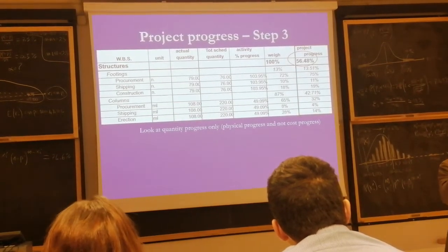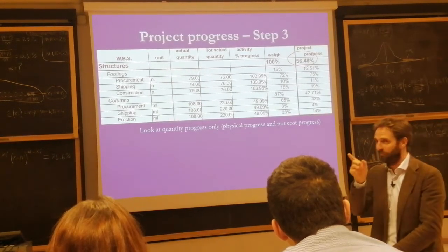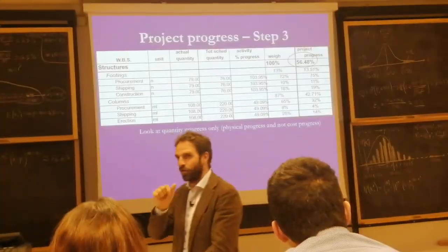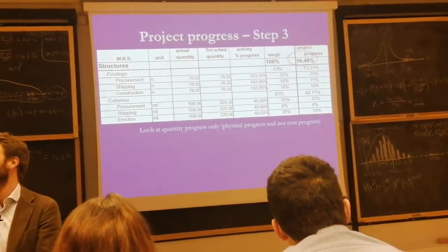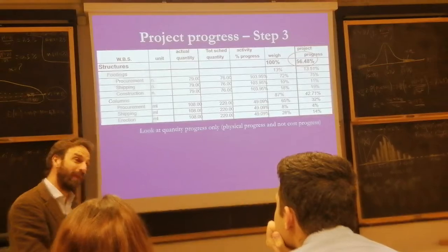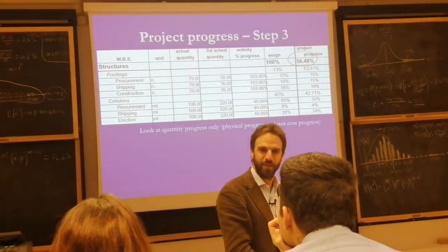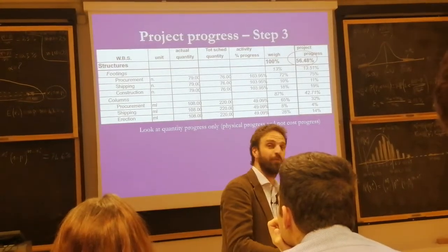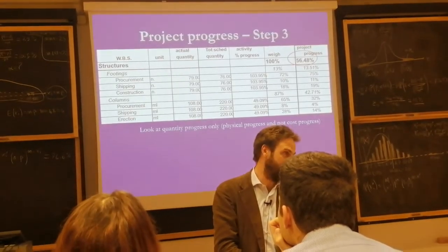So I need to absorb the extra quantities and the extra time and efforts into my original budget, which is the contingency, right? But if I have not placed enough contingency, it's my problem. And now you understand your capstone project and why you need a contingency on top, because it's risk capital.